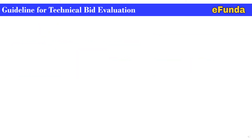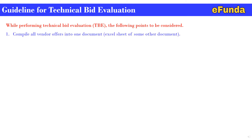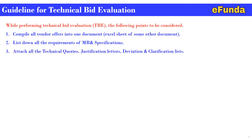Guidelines for Technical Bid Evaluation. While performing technical bid evaluation, the following points are to be considered. First, compile all vendor offers into one document, that is an Excel sheet or other document. Two, list down all the requirements of the MR specification. Third, attach all the technical queries, justification letters, deviations, and clarification lists.